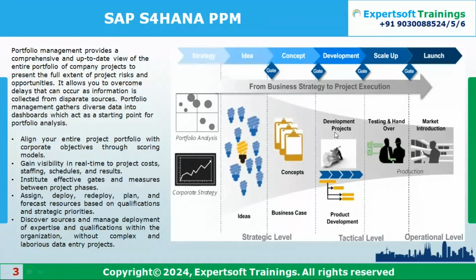In this deployment stage, you're creating some sort of product, and that product you're going to link with the operational projects. There are some gates for this, right? These are the current three gates. If you pass this gate, the system will automatically create an operational project for you, based on the template you have created, and you're going to start working on that. The day-to-day activities going on in these execution stages,